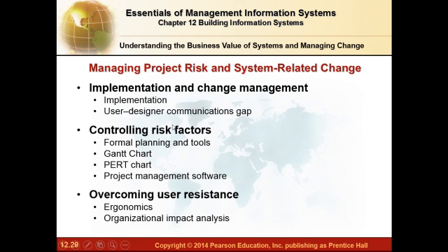Okay, next, controlling risk factor. The more complex, the more the risk. That's easy to understand, okay, but harder to manage. Risks associated with the project should be clearly outlined and discussed. So the three major risks are project size, project structure, and experience with technology. As Laudon and Laudon point out, the bigger the project, the bigger the headaches. So it's pretty evident that managing 2 or 3 people working on a small system development project is easier than managing 20 people working on a huge project that will envelop the entire organization.